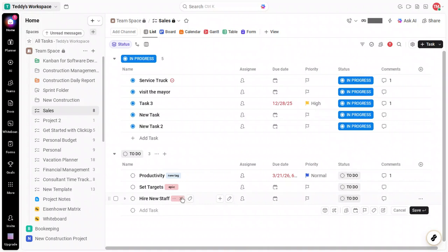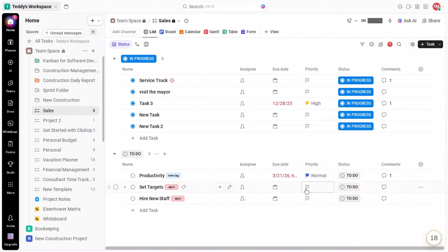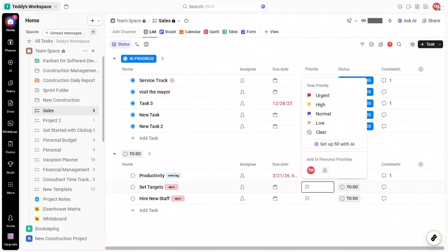Create a separate task for items like "password encryption and validation implemented," or "account recovery flow with secure token." Each time, keep titles outcome focused, save the task, open the details, and apply your tags, including the epic tag. As you build out this list, you're effectively sketching the roadmap for your epic in small, testable chunks that can be assigned, tracked, and delivered.